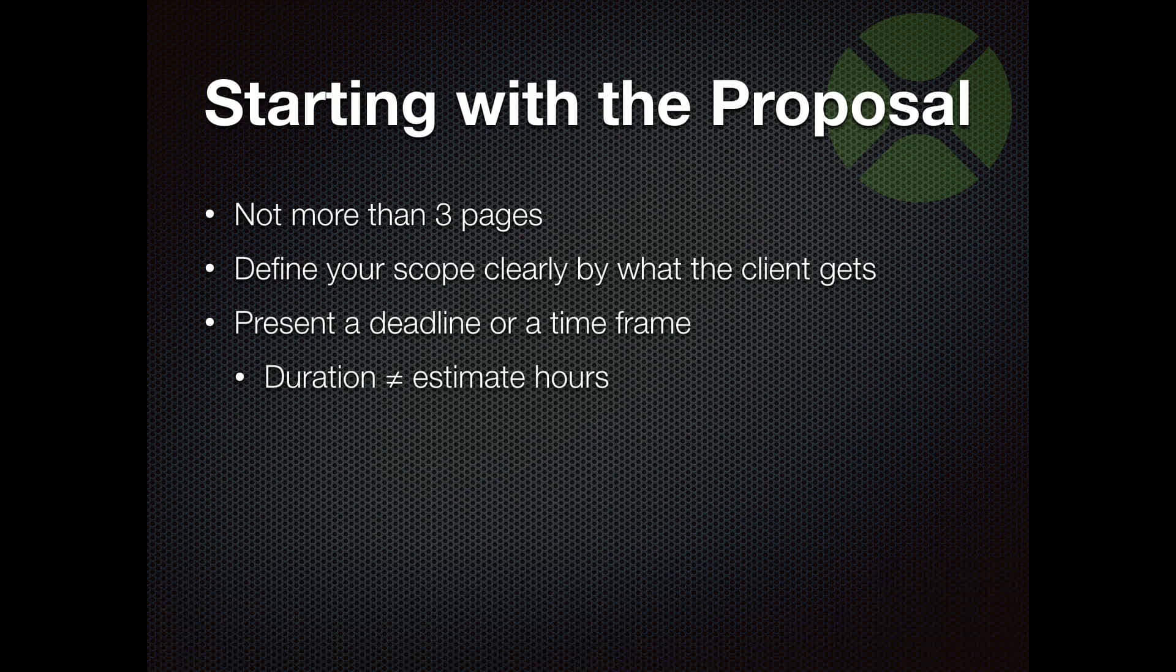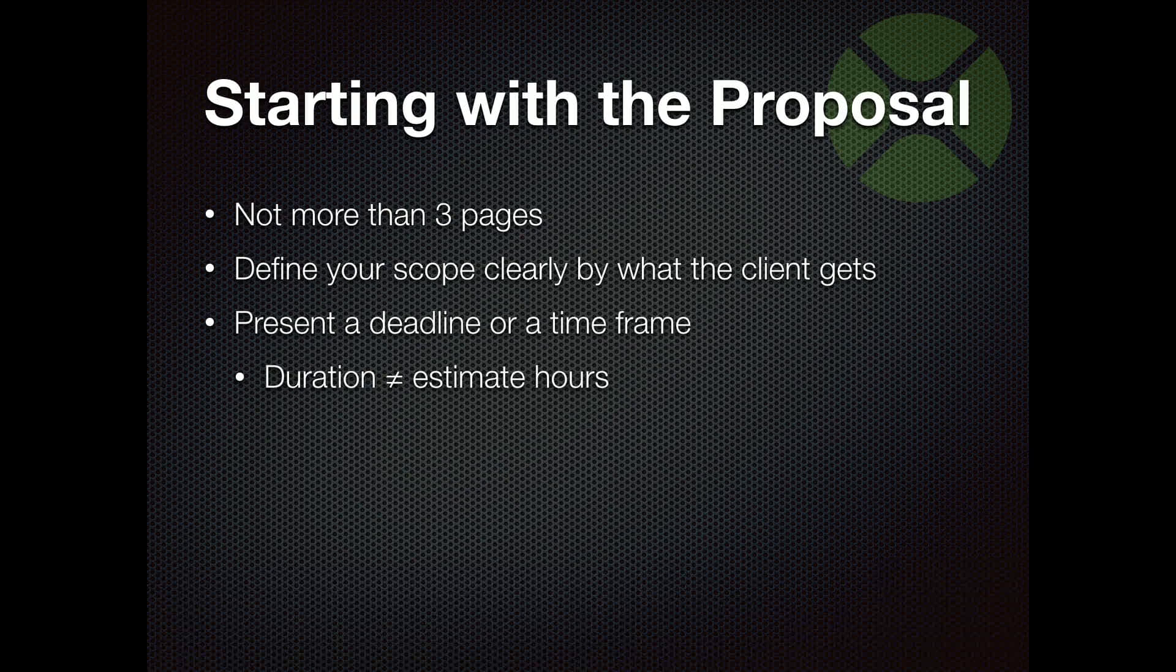A duration is not your estimated hours. So you guys all know that. If you say it's going to take you eight hours to do it, as far as a budget goes, that doesn't mean the client's getting it in eight hours. But that's something to make clear as part of your proposal, that that's not the same thing to them.